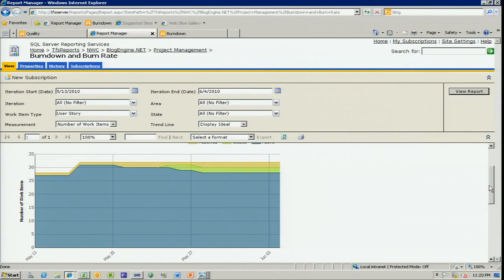Lazy product owner. They're not looking at it and closing it out. Could also very well be. What's that? Ton of work in progress is another. In other words, people are multitasking all over the place. Tasks are closing down, but they're not working on the tasks to focus on closing business value. So this is another interpretation of some of these reports.